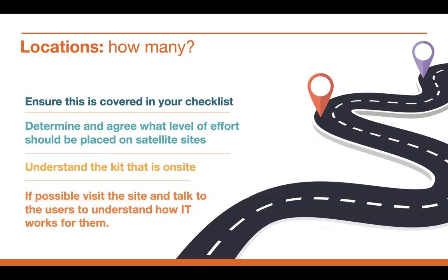Understand the kit that's on those sites as well. Can you remote in? Can you do diagnostics fully remotely without having to send someone to these sites? Knowing what's on site will help you to understand the capabilities you need or the efforts you need to put in. If possible, and if you agree this with a customer, go to site and take a look. Never take what the customer says as gospel. You need to really satisfy yourself that you understand and know what's on site.